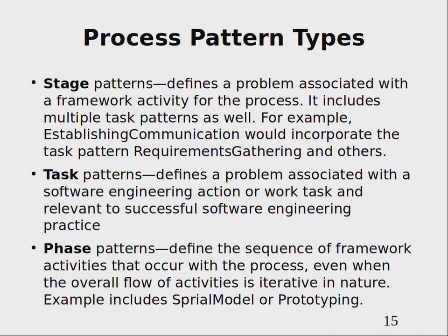And usually a task can be done by a single person, because when we talk in more detail about management, if there is more than one responsible person for some task, then checking who is responsible and who will actually do this is much more murky and blurry, and you will probably not get the intended results.